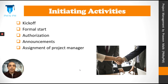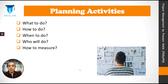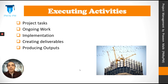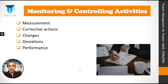Initiating involves kicking off something, formally starting something, authorizing a project, announcing to the world that we are starting the project — but above all, assigning a project manager is a major part of initiating activities. Planning activities involve asking questions like: what do we do, how to do these things, when do we do these things, who will do these things, and how to measure. When we answer these questions, we have our plan ready. Executing activities include actual project tasks, ongoing work, implementing something, creating deliverables — internal or external for the client — and producing outputs. Monitoring and controlling means measuring something, taking corrective actions, making changes, taking care of deviations, and checking the performance of the project. Finally, closing activities, just like initiating, are formal — they include documenting everything, handing over to the client, and making final reports.